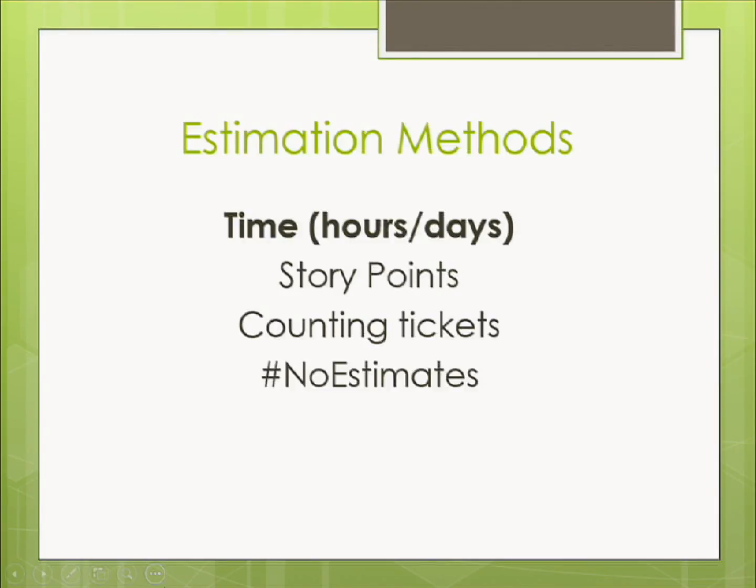This works really well if you're on an application where you know the application well, you know the business, you know the subject matter, because at that point, if I say something takes 4 hours, I have a pretty good idea that it's going to take 4 hours. And again, you really need to have the people doing the work doing the estimating, because I might say something's 4 hours, but the guy next to me may not know as much as me about this part of the system. It might take him 2 days.